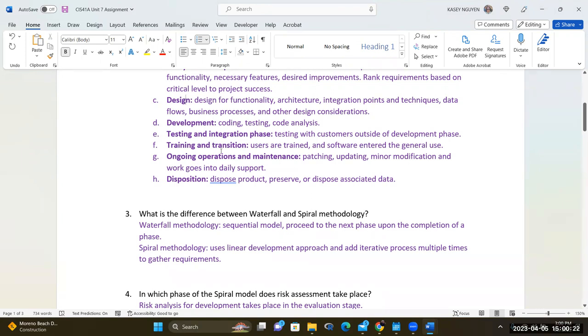Then if it's successful, we would transition it through the integration phase, right? Deployment is always a challenging area. Even if you test and everything is clear, when you deploy, you go live, and the next day things could go wrong. It can't connect to the server or something is wrong. So once we go through and have it smoothly, you would train, right? Normally when I do a project like this, before the integration, I move training up a little bit. So I tackle things a little bit differently because I really feel like the software is useful if the user knows how to use it well, instead of breaking it and then fixing it and then retraining. And then we would transition. But keep in mind that some of these go back and forth. It really depends on the complexity level of the project.